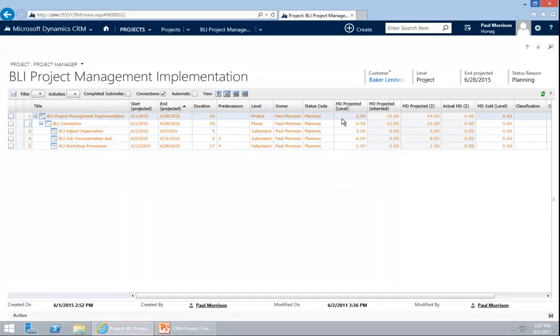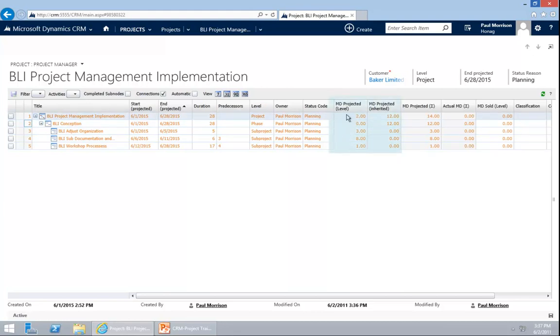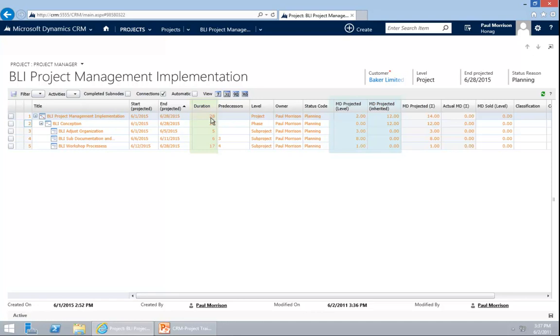When we talk about man-days, please note that the man-days can be different from the duration. That's because it depends on the people you have available. If you have a duration of like one week, five days. It might be that you have for example two people working full-time. Then you would have 10 man-days projected. If you have only somebody working half-time, it would be two and a half days.